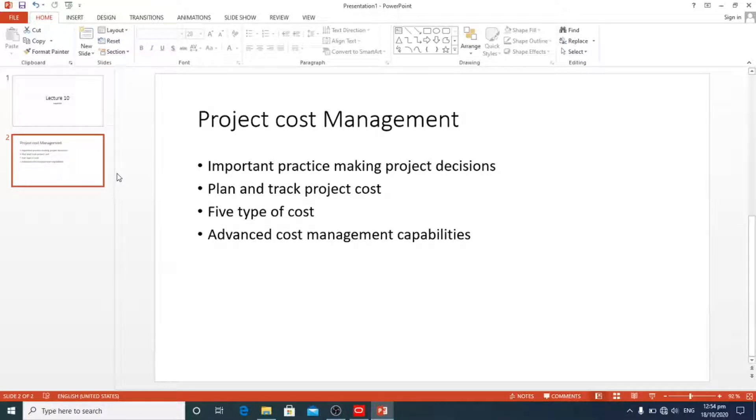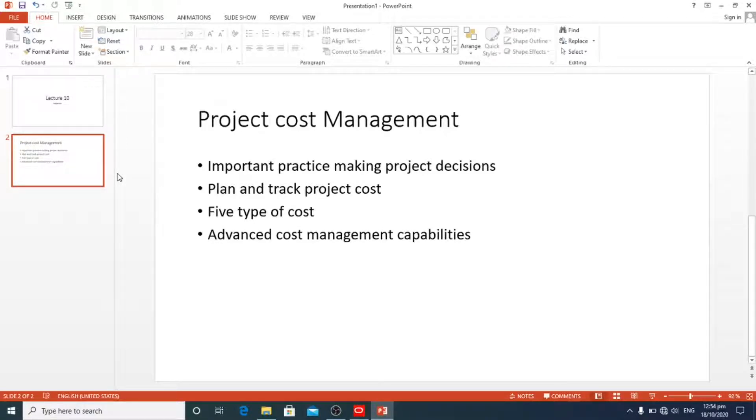Direct and indirect cost can be assigned to activities as expenses without using the resource in Primavera P6. The expense tool is useful for project-specific material, labor, and equipment cost.